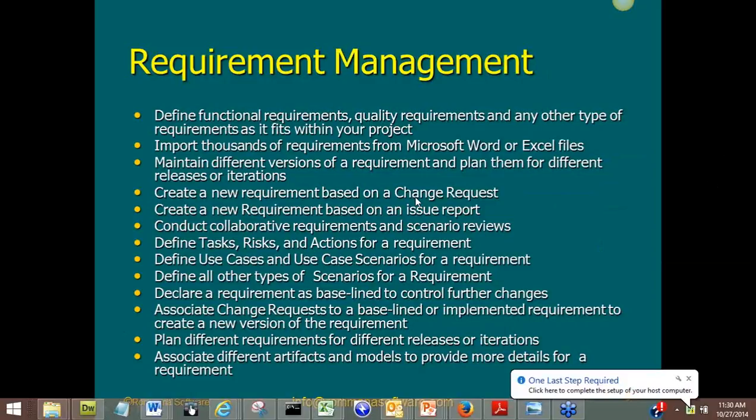So what you can do is people can continue to work with version 1 and the other people can work on version 2, such that we can put the release out on time as we planned, but then we can have a patch that delivers version 2 of the requirement. Okay? So the work with multiple versions of the requirements can continue at the same time. Only people who understand requirement management and project management know that. Tool vendors and tool developers are not requirement engineers, and they're not project managers. They're just tool developers. All right.